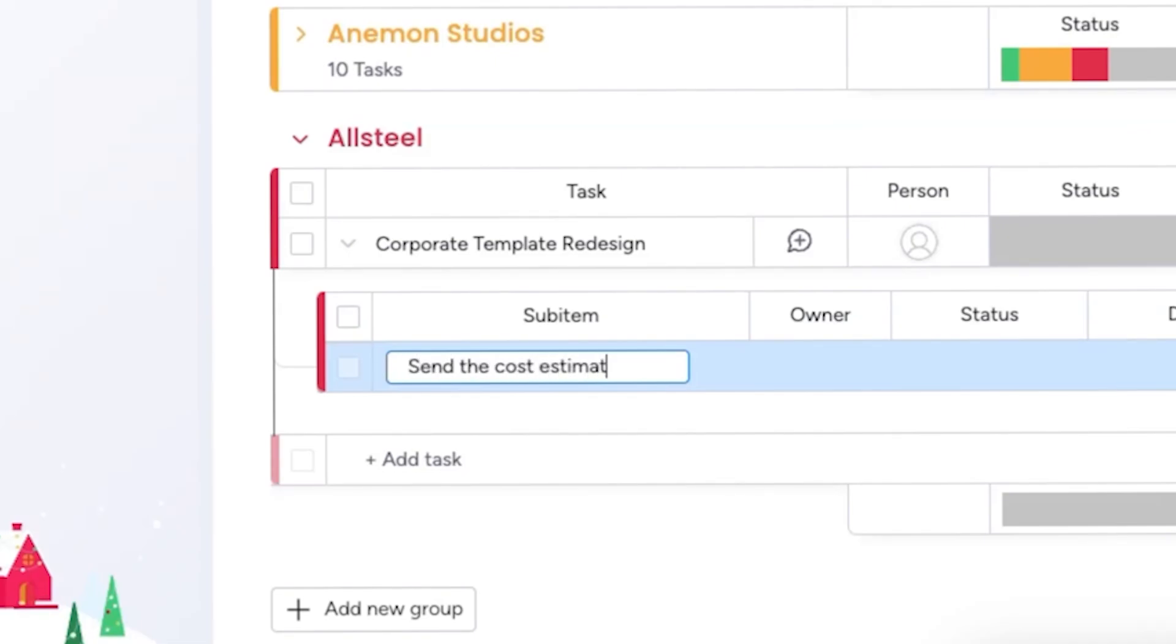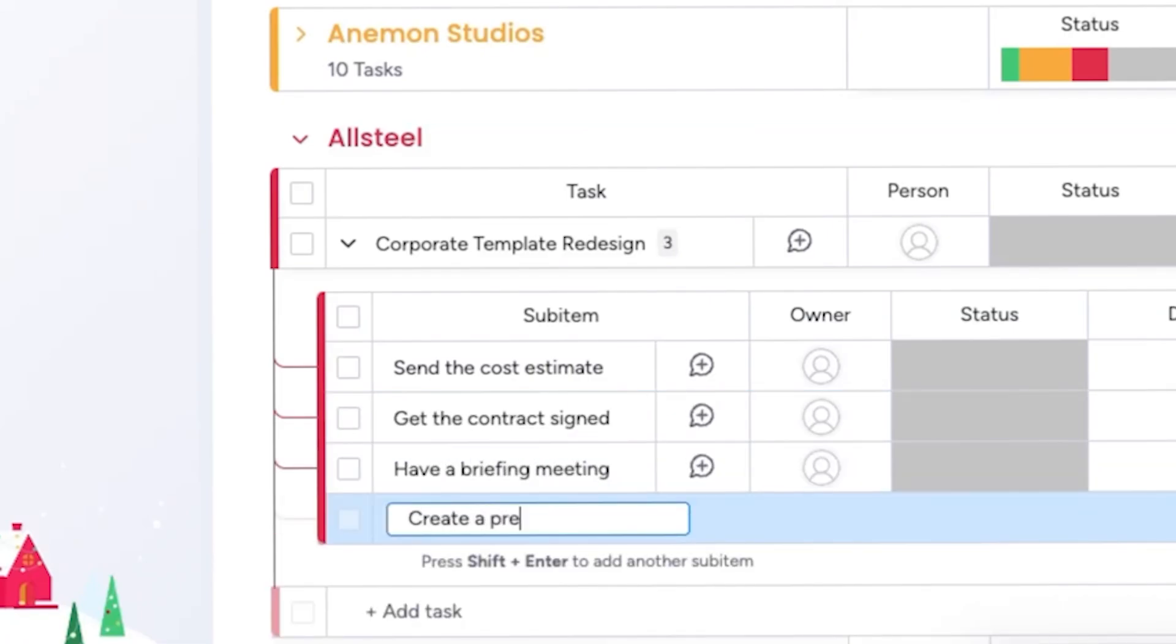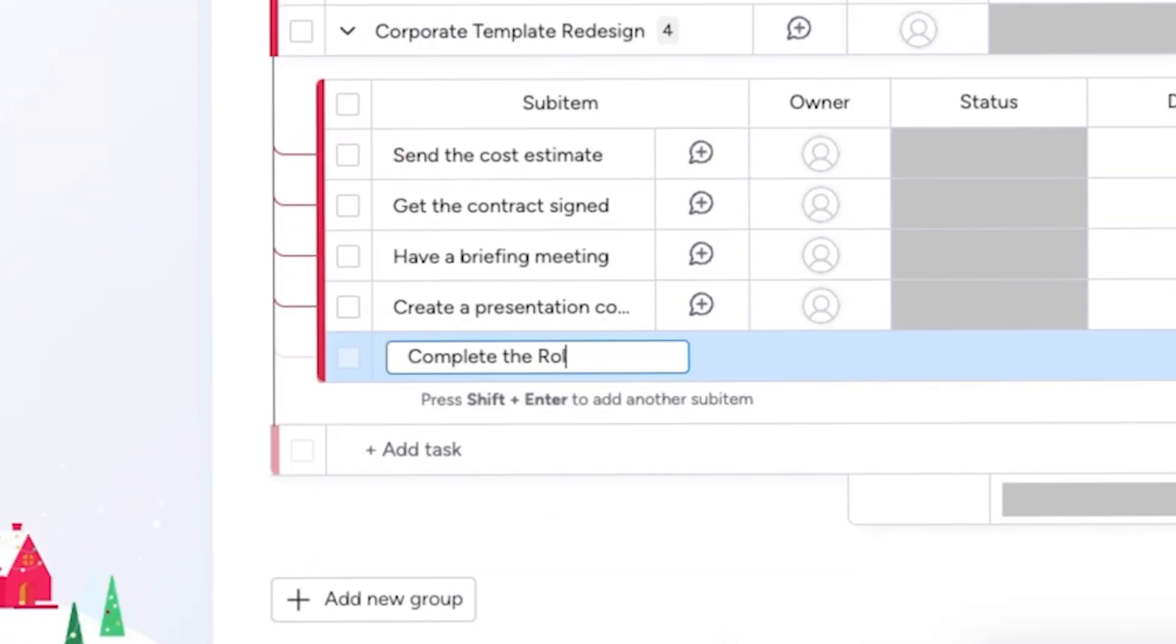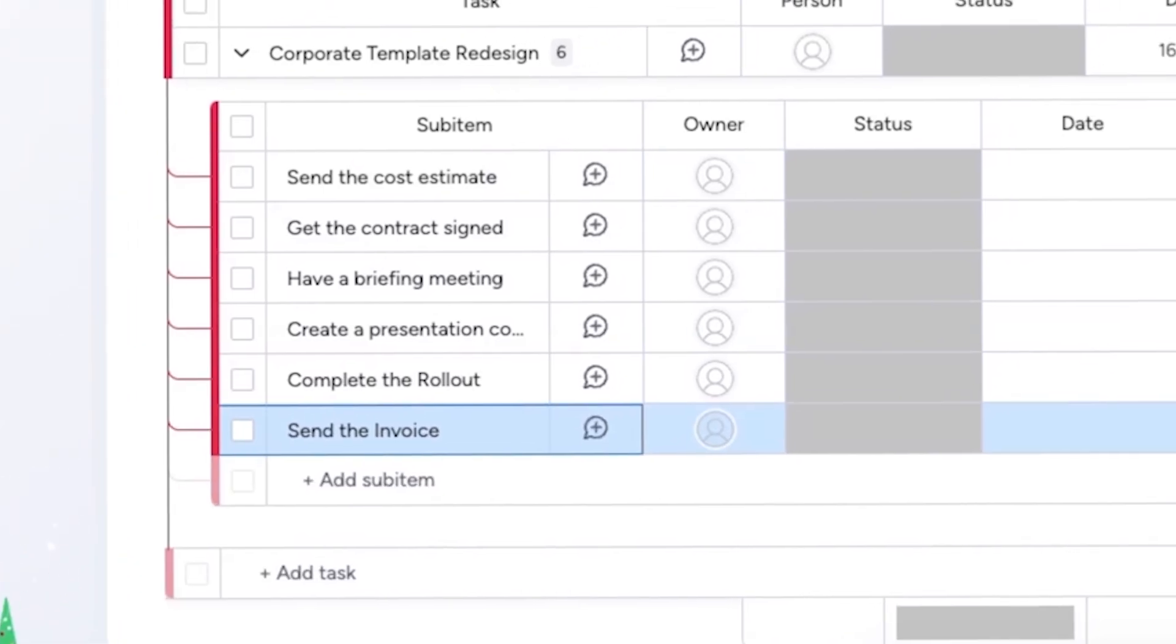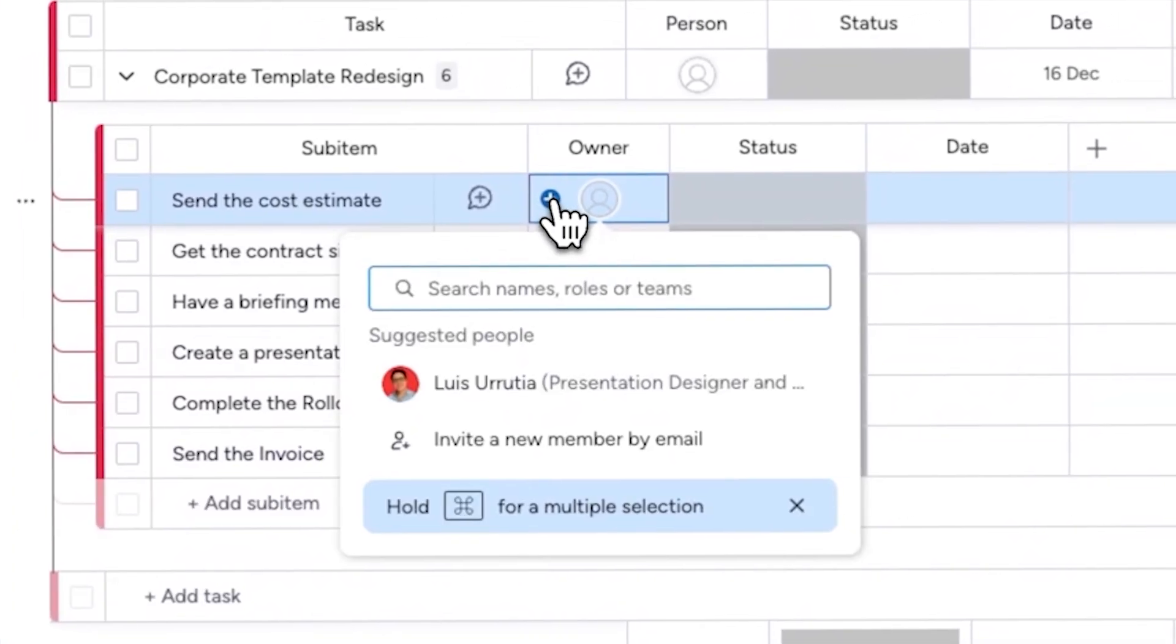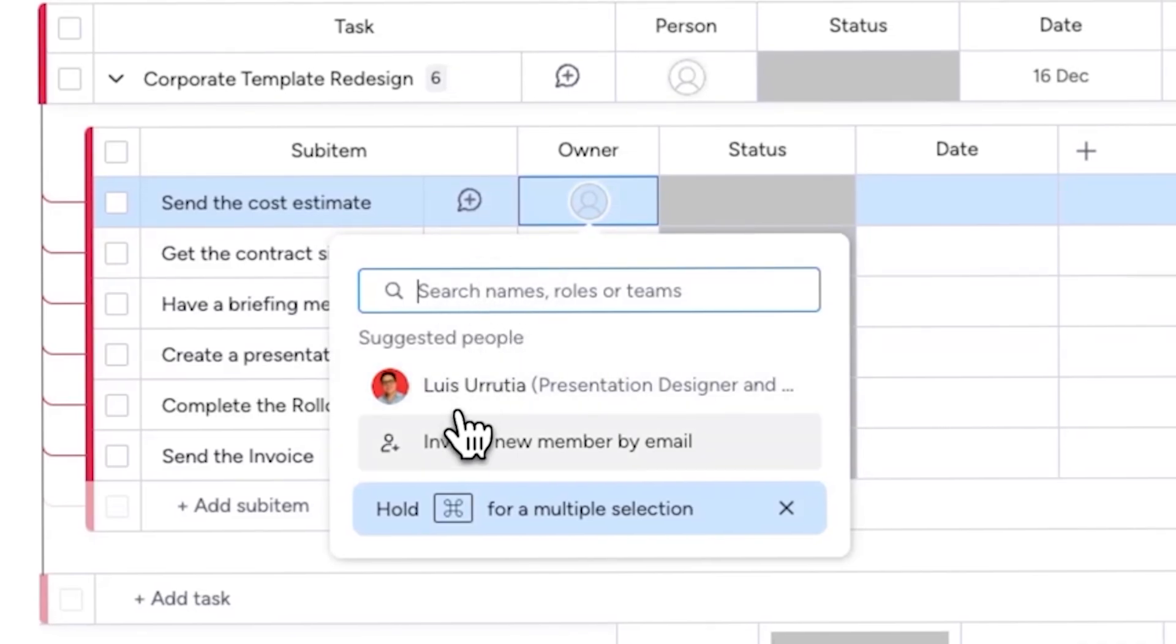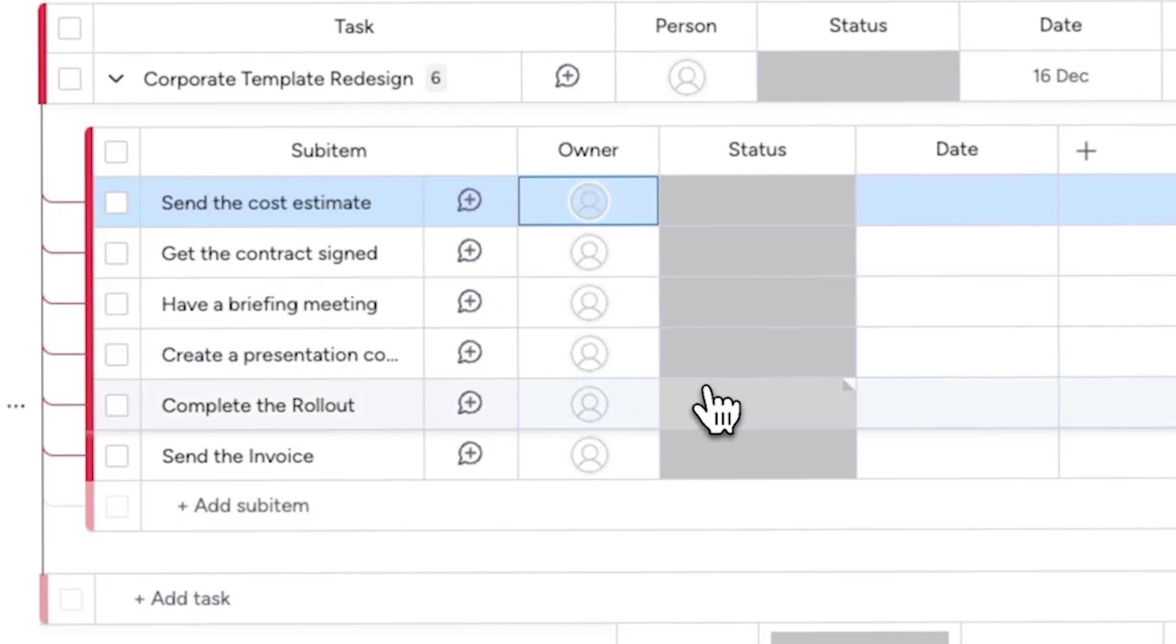Fortunately Monday.com lets you add subtasks to each main task so you can break down larger projects into smaller steps. For example, I'd need to send the cost estimate, get the contract signed, have a briefing meeting, create a presentation concept and submit it for approval, complete the rollout and send the invoice. Since some tasks require help from my team, I can go to the person section, click on the plus icon and assign specific tasks to my admin staff. This allows me to focus on other aspects of the project while my team handles this.